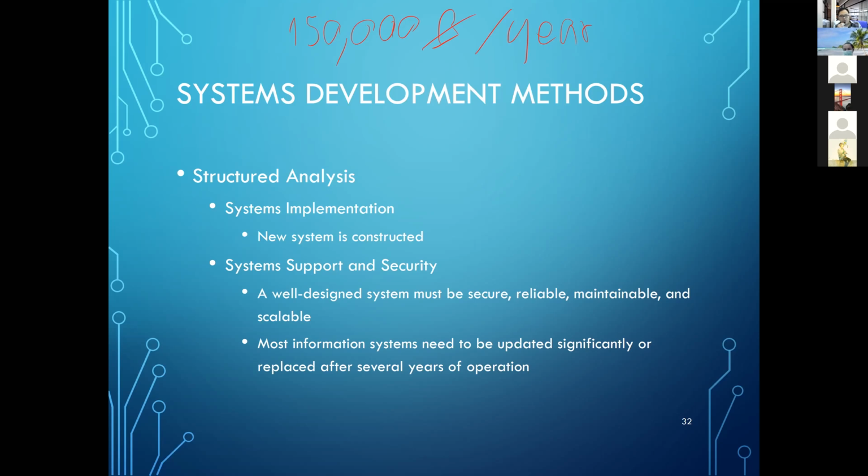Around the world they use this percentage basis, 15%. For some companies, if it is a small software, you may have a 10% maintenance fee, or it might be up to 17% for a large system like SAP. But it's not more than this, because of what? They have a formula to think about. Normally for technological stuff, the lifetime should be 3 up to 5 years.